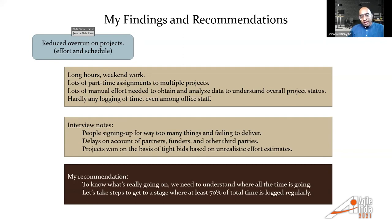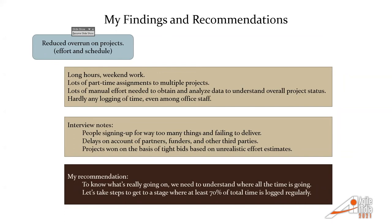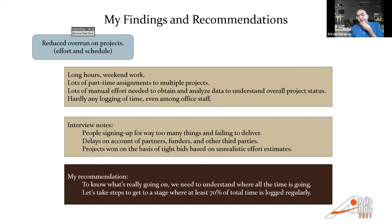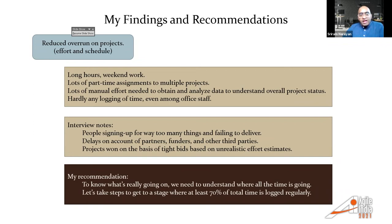So part of my key recommendation — the first stage was: let's take some steps to improve time logging. I had outlined detailed steps, but the point was the first milestone: let's get to a stage where at least 70% of total time people are spending is logged into these systems, so we know where it went. That was my first piece of advice. At this point I was informed we were 30 minutes into the session — and I noted that being behind schedule kind of matches the situation I was describing.